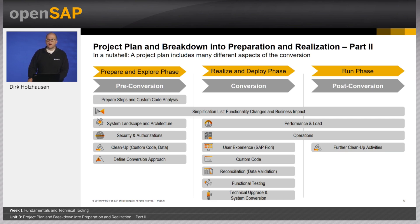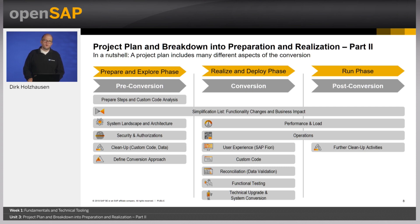During the realize and deploy phase, the required recommended actions from the Simplification List must be worked on. Additional topics to consider in the project plan include: performance and load tests, user experience and Fiori-related activities, adaptation of custom code to make it S4HANA and HANA ready, data validation and reconciliation activities, testing in general, and operational aspects for handing over S4HANA operations after go-live. After go-live, during the run phase, post-conversion activities can be addressed. Some changes from the Simplification List can be done during the run phase, along with continued cleanup activities.